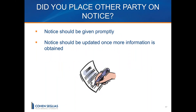The other big thing with force majeure is notice. Notice is always critical with construction contracts and any sort of claim — it should be given promptly. You can update it once you have more information. You might not know the exact impact yet, but you can put the owner on notice that you expect delays and then update with a timetable once you have it.